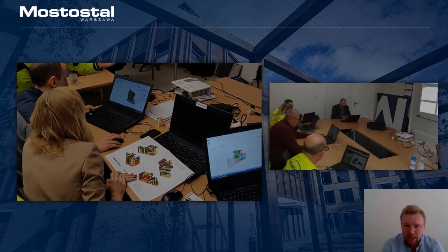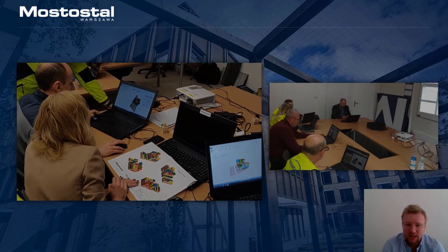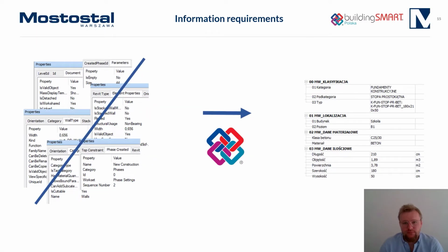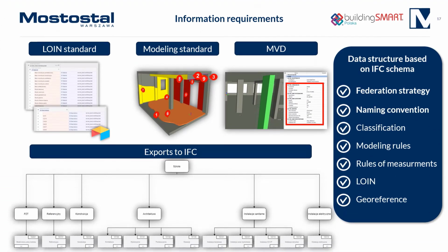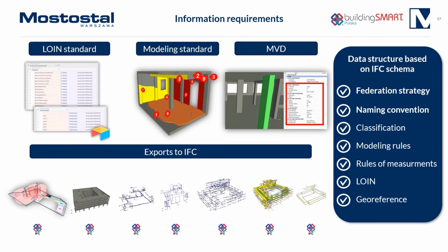We prepared our own trainings, adapting them to the construction processes and our needs. Construction workers don't need to use native files, this being reserved for designers and BIM coordinators. These workers can, however, easily work with IFC files, which contain the most important information and can be viewed by simple browsers. Because there were no BIM requirements from the client, we were able to create our own, maximizing the use of openBIM standards. At this stage, the rules of information exchange between the stakeholders of the project were established.